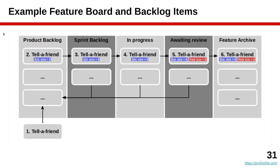Here is a screenshot of how it looks on GitHub, with the product backlog, sprint backlog, in-progress, awaiting review, and feature archive columns. When it's time to implement a feature, it moves from the product backlog to the sprint backlog, then to in-progress when someone picks it up. When finished, it goes to awaiting review, and if the product owner considers it complete it goes to feature archive. If not completed within the sprint time box, it goes back to the product backlog.